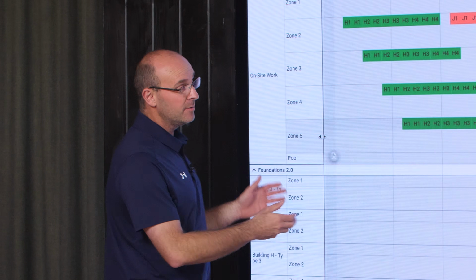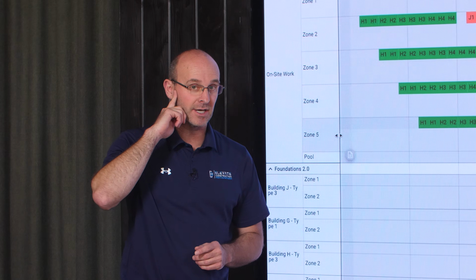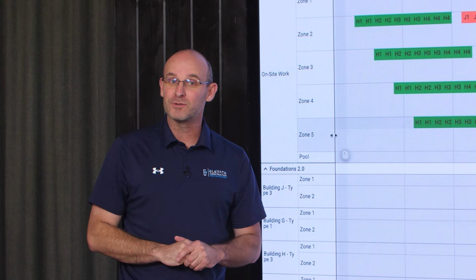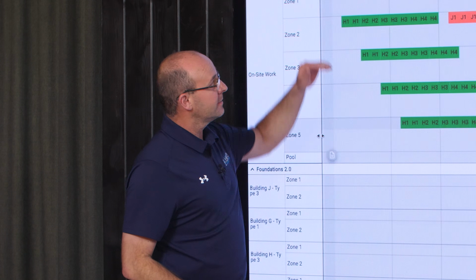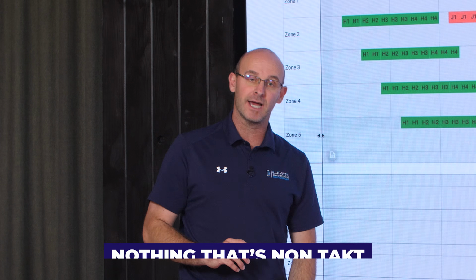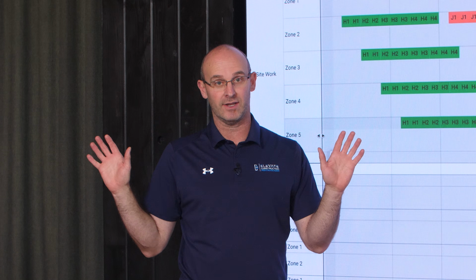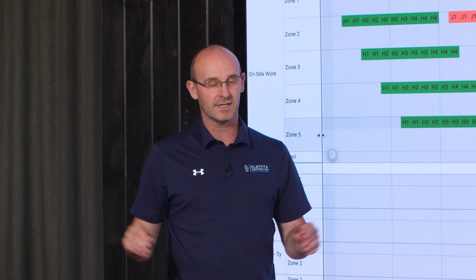So this is an image of a Takt production plan. I want you to hear production plan, because there's nothing that doesn't fit on the production plan. There is no pre-Takt, there is no out of Takt, there is no post-Takt. Everything is Takt because even if it's non-rhythmic, even if it's a one-off, it still fits in the time by location format. So there's nothing that's non-Takt. In fact, in Takt planning, we do high schools, we do airports, we do bridges, civil, anything and everything, because everything fits into the format. So think production plan. There's no pre, out of, or post-Takt. Everything fits into the Takt format.